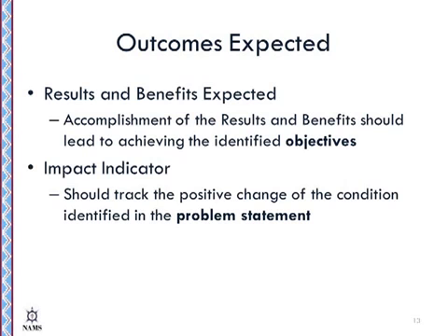Remember when you create your impact indicator that you need to choose an indicator that can be measured. You need to include baseline data on the indicator prior to grant implementation. Sometimes this information matches information provided in objectives and need for assistance. You also need to provide an end-of-project target number, or what you expect to have achieved at the end of the project. Because ANA works to fund projects that have continued impact in their communities, you also need to provide a target number for 3 years after the project has concluded.